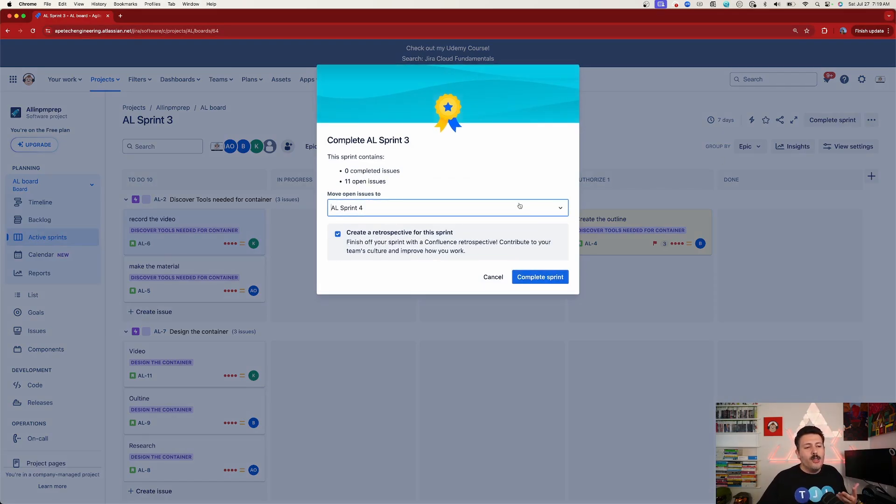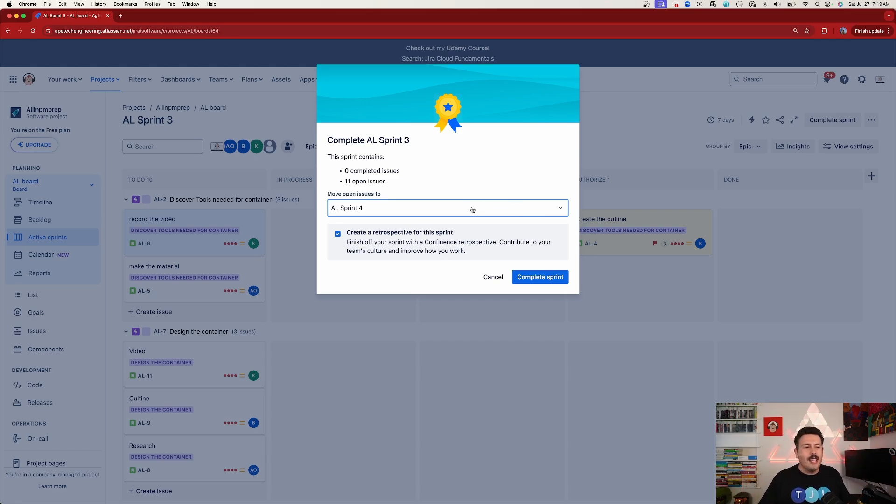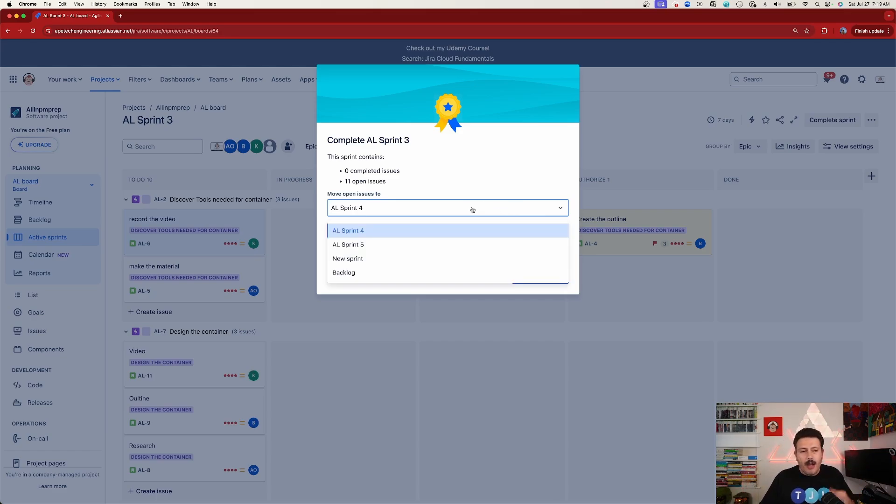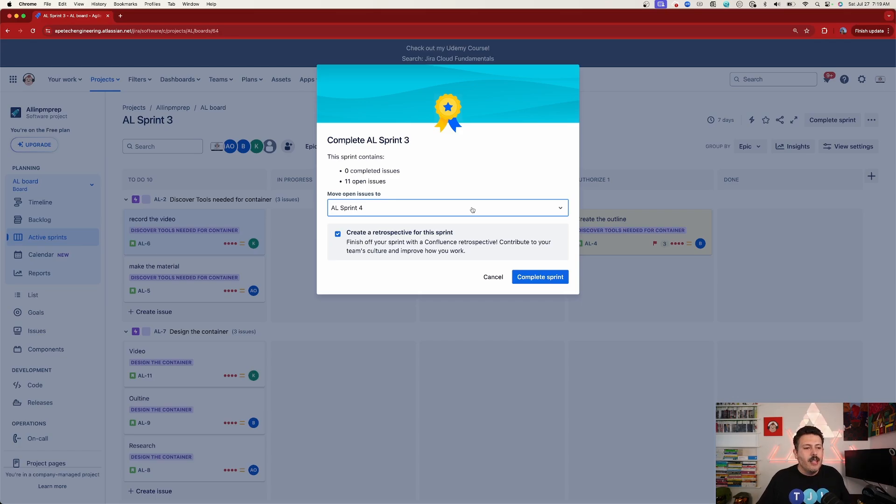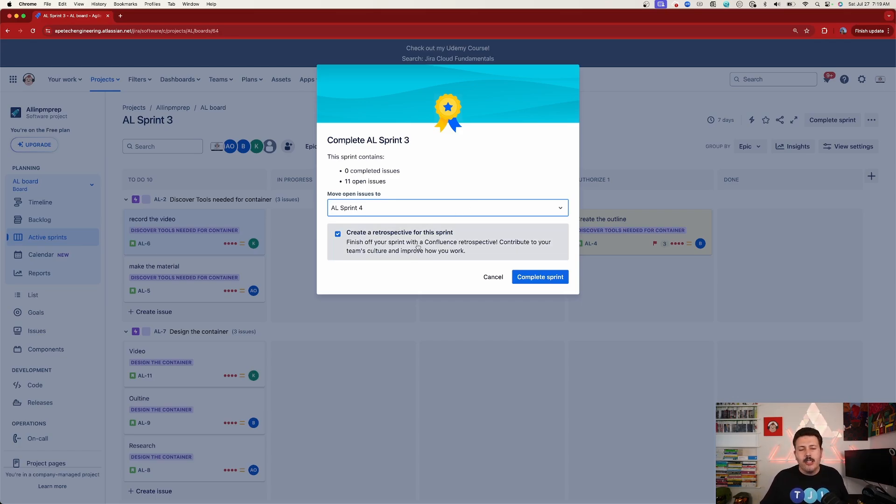At this point, this is a very familiar screen, at least the top part is. And it's going to tell us, hey, here's how many issues were completed, here's what we're rolling over to the next sprint or to the backlog, wherever you want. You get to pick. And this is the new box right here.